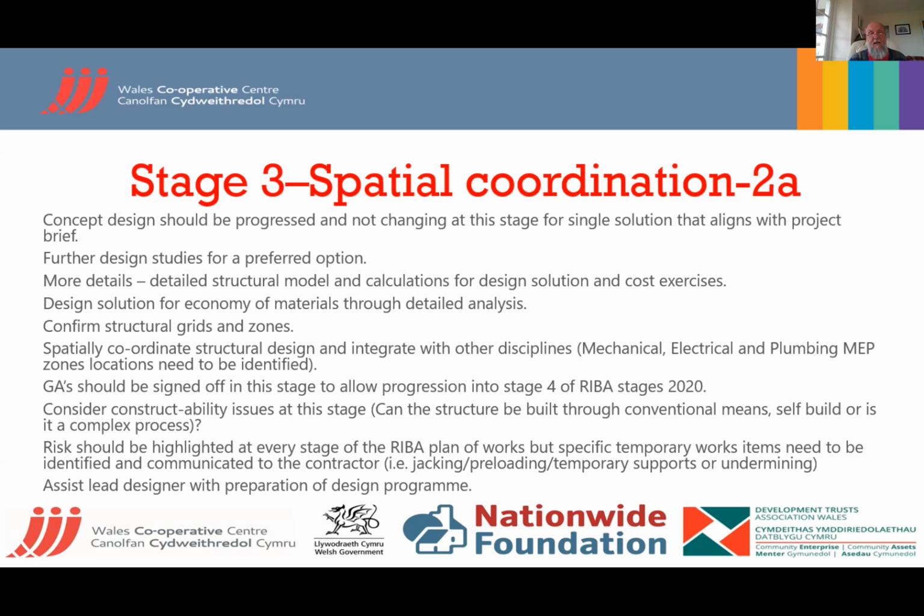The developers will sometimes flex what the construction is according to the availability. There was a time when you couldn't get bricks or cement from Europe, so they went to timber frame, and sometimes a shortage of timber, or they can get brick and blocks more economically. They'll change the structure to suit the costs and the demand for the properties.